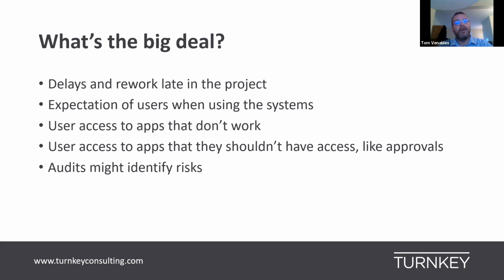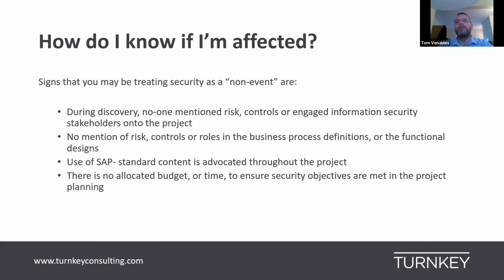Your subsequent audits after go live, you will get a grace period from most auditors if they're feeling kind to say it doesn't need to be perfect come go live. But 6 months after go live or a year after go live, and they identify segregation of duties conflicts or toxic combinations of access or even privileged access that users are gaining just a little bit too much to the system, that's going to be difficult to pick apart. Those remediation projects, and I've done dozens of them, they're not easy because you're revisiting design decisions that were taken by a project team that's exited. You're in a run and maintain function now, and you don't have the bandwidth that the project team did to design those processes with that laser focus.